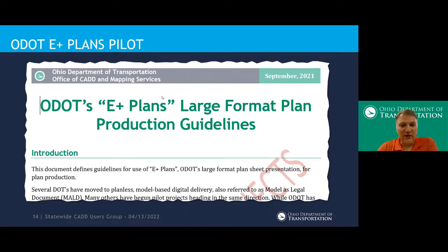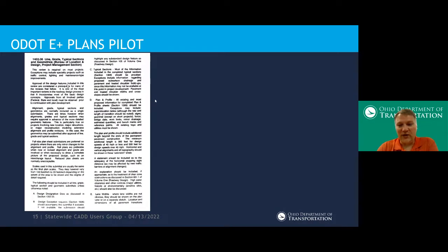This came out of an idea from an ODOT ACEC ORD production group, where there was a discussion on creating a pre-stage 1 submittal, and it was thought that would be helpful to addressing plan production changes that resulted from stage 1 geometry comments. And we all get it, right? You produce your stage 1 plan, and then there's some geometry comment that comes in, and you've got to go back and reproduce all those plan sheets because the alignment moved or something.